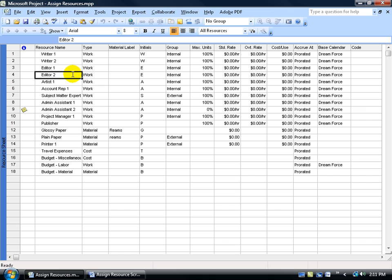Third will be accurate assignment. In other words, we're going to be using what's called unit information for our work resources. A unit is a measurement of a resources available working time, and it's displayed as percentage. Full-time workers work 100%, and part-time is 50%, and it's based upon an 8-hour day.